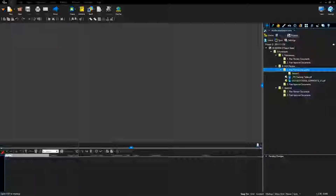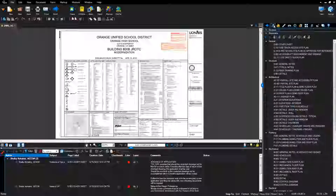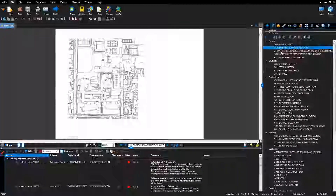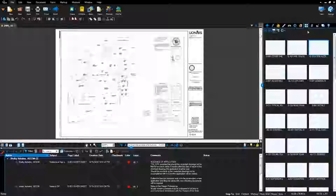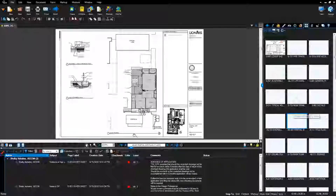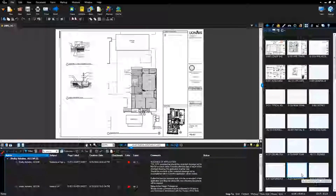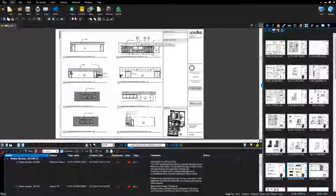Double-click the folder to open. Select documents for review, right-click the document, and select open. Review the document to verify the project is OTC qualified and that it is a complete submittal. If the submittal does not qualify for OTC review, notify the design professional of the rejected submittal and refer to Procedure 1804 for regular project review. The lead plan reviewer shall notify the EPR administrator that the project does not qualify for OTC and that registration and submittal as a regular project is required. If the submittal is not complete, notify the design professional that the OTC appointment will need to be rescheduled and a complete submittal re-uploaded to DSA Box. The lead plan reviewer will notify the EPR administrator that the project is not complete.